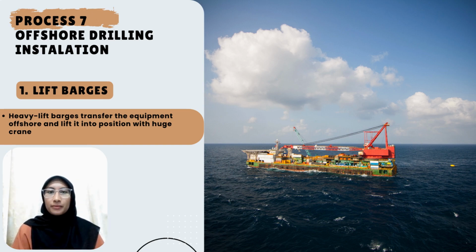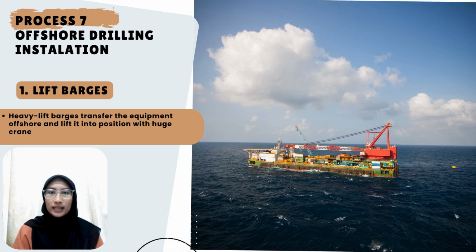Major marine systems can be broken into modular lifts for ease of installation and to employ smaller crane capacity. A processing facility, for example, can be built in various modules that are then put offshore one by one in accordance with construction planning and timing.